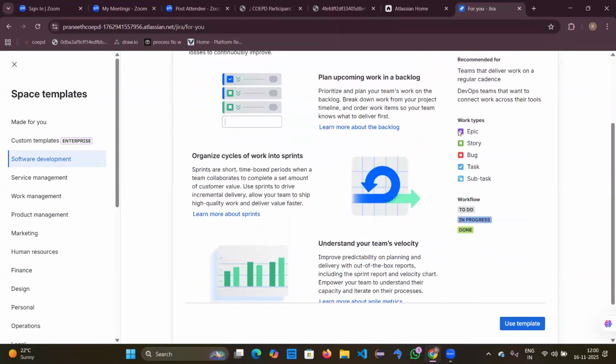Okay, so I forgot to tell you about the main hierarchy in this whole Scrum. First an epic will be coming. An epic is just like a large user story. A large user story cannot be completed in a single sprint, right? So we will be dividing a large user story into multiple user stories, meaning we break down a large thing into smaller pieces that can be named as user stories.